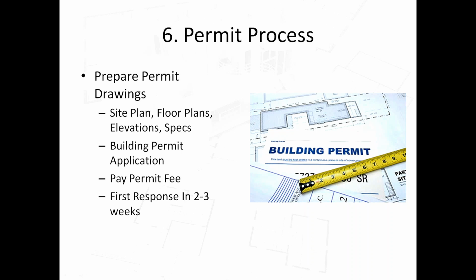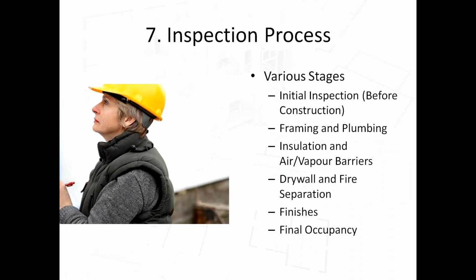And so that's why I always give a lead time to my clients of about 4 weeks, because even after 2 to 3 weeks, once we get that revision letter back, there's a bunch of back and forth between me and the client, between me and the city, and it's a lot of emails and a lot of phone conversations to clarify things, and sometimes it's easier for me to just go down there and really hammer things out. Okay, so a month generally is a good time frame.